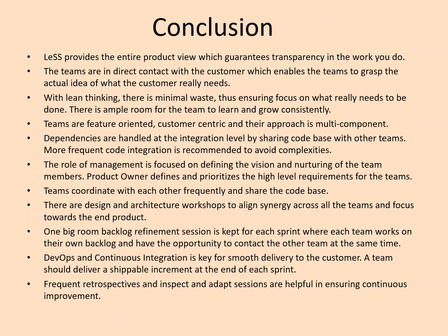Teams coordinate with each other frequently and share the code base. There are design and architecture workshops to align synergy across all teams and focus towards the end product. One big-room backlog refinement session is kept for each sprint where each team works on their own backlog and can contact other teams at the same time. DevOps and continuous integration is key for smooth delivery to the customer. Each team should deliver a shippable increment at the end of each sprint. Frequent retrospectives and inspect-and-adapt sessions help ensure continuous improvement. These are the final takeaways from the LeSS framework.